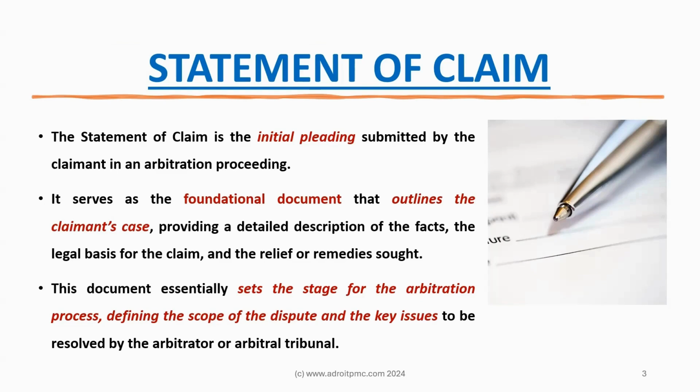And if it is construction, and the claimant is seeking variation claims, then approvals, inspections, and sometimes drawing-related documents and communications, whether email or letters, are needed. He has to make sure that whatever claim he wishes to seek during the arbitration proceeding, he has proper support and evidential proof for all those claims.